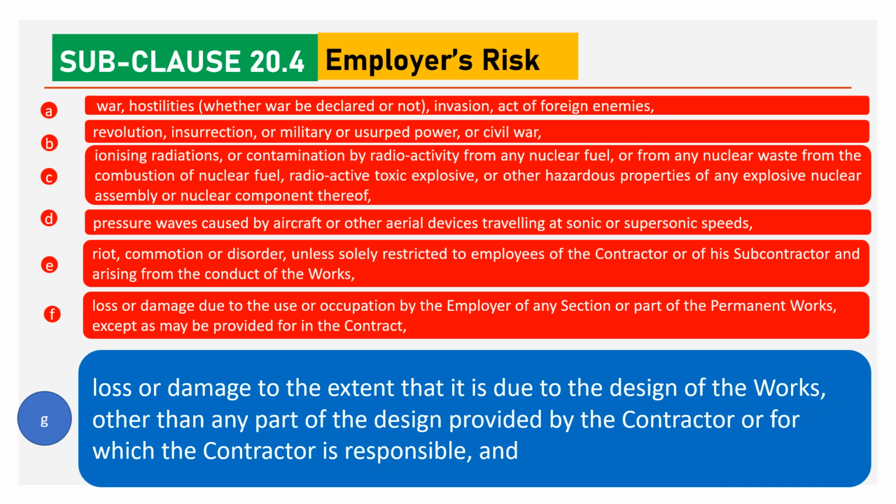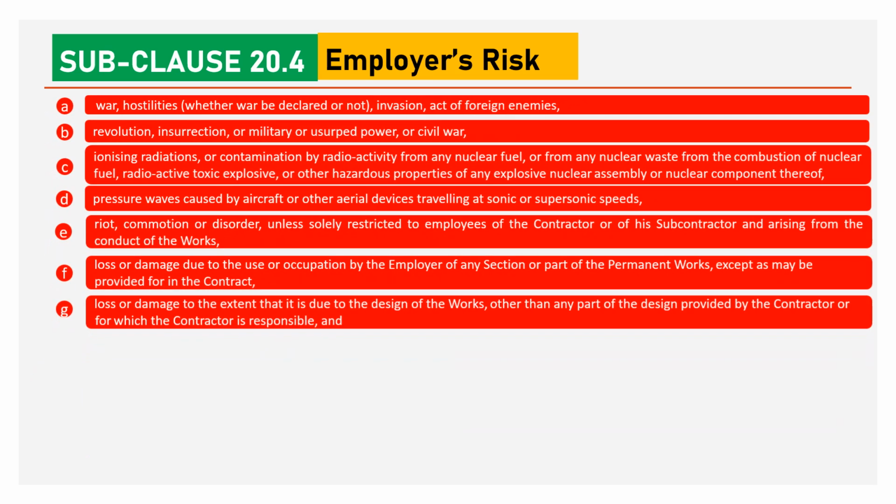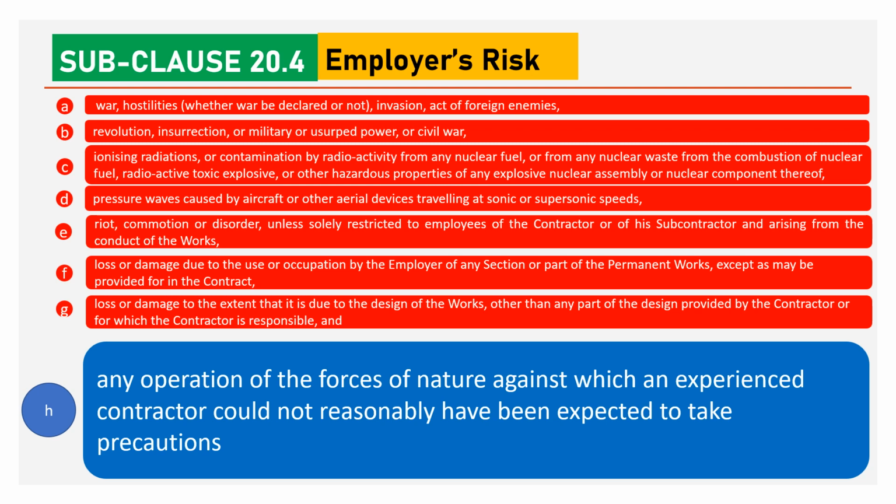This is very important. Loss or damage to the extent that it is due to the design of the works, other than any part of design provided by the contractor or for which the contractor is responsible. Design is the employer's risk. However, if the design is provided by the contractor for which he is responsible, that will not be the risk of the employer. The last is any operation of force of nature against which an experienced contractor could not reasonably have been expected to take precautions.